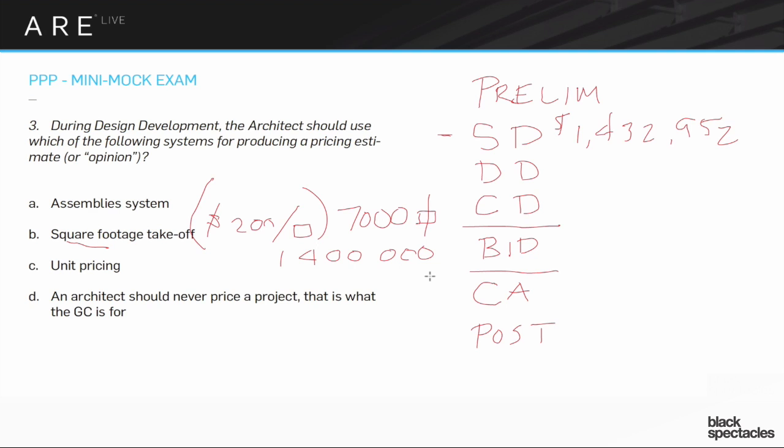That's a completely reasonable way to do SD. In schematic design, you're using rounded numbers, taking square footages, and making really big basic assumptions based on who the client is and the work you've done previously. If you think they have very expensive taste, maybe it's not $200, maybe it's $300 or $400 a square foot. Or maybe you know they're going to go the cheapest they possibly can, and it's going to be $150 a square foot. So it's not just a random number, it's a knowledgeable number, but it's a rounded number. And you're getting this logical level of estimating for that phase.